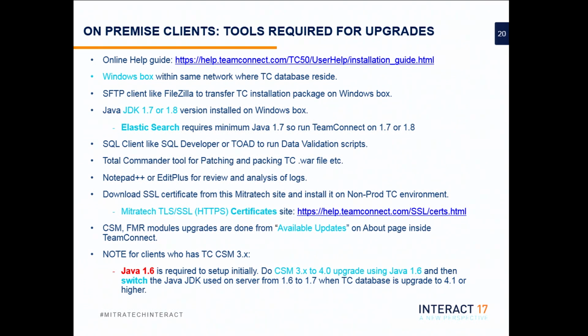What we have learned is that for CSM upgrade, if you have Java 1.6, keep it that way, upgrade the CSM to 4.0, and then once you are on the 4.0 platform, you can switch your Java to the newer version and proceed with the upgrade. So you have to have both Java versions on that machine just for a short duration until you get your CSM to the newer version.